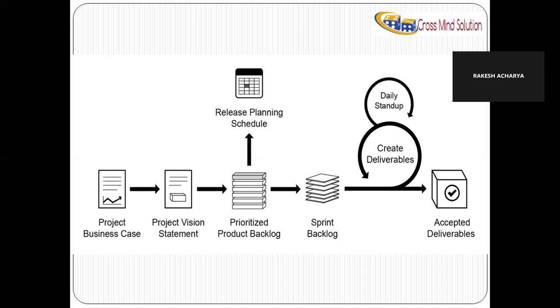Your development team is doing the development for the next 2 weeks, and meanwhile, your product owner will think about more functionality and add it into the backlog. So it's an iterative process. The product backlog will keep increasing. Today you have two backlog items, tomorrow you might get 10, until you have completed all the functionality that you want to deliver or want in your application.